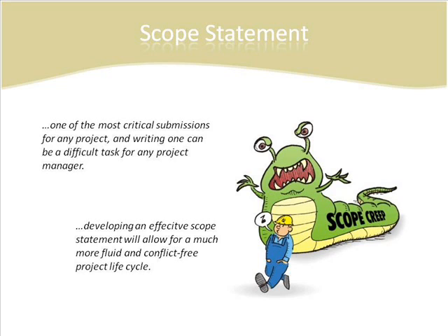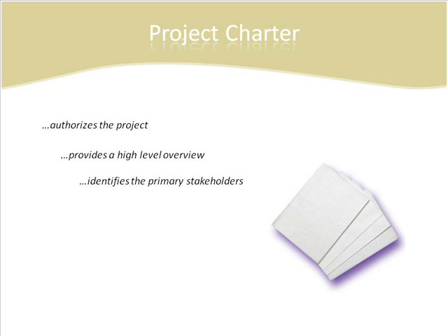If there are any changes to the project, it is very important that scope change addendums are added and signed by the involved parties. The biggest thing to avoid is what is called scope creep. Scope creep is a situation in which the scope gradually increases over time as the project continues and things are added. The charter often includes the name of the project owner as well as project sponsors. It may often identify the project objectives and goals as well as the resources and time constraints. The charter is used as a focal point throughout the life of the project.